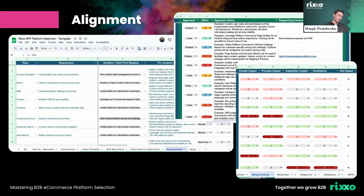So I think that's a really core part of this tab within the template that really helps in terms of aligning that stakeholder group and makes you not have to do as much stakeholder management later on when something is assumed and it goes wrong, for instance. Yeah, totally. Because if you've got something, maybe one vendor's scored it a 5 and one scored it a 1, that could just be that person's different interpretation of the requirement. Whereas if you've identified where the finish line is, they're both going to cross at the same point, and so they can give a more realistic measure of how much work there is. Yeah, I completely agree.